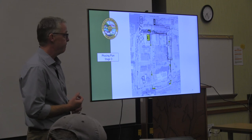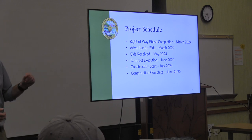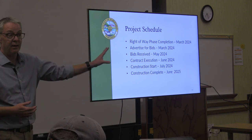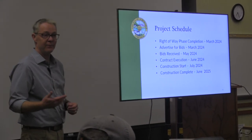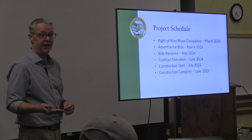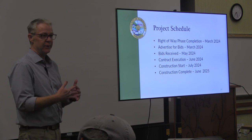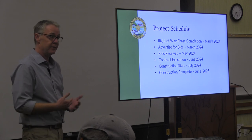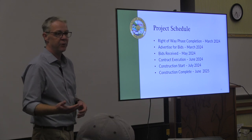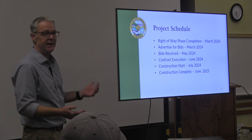Correct. Okay, understood. So here's the project schedule, and I'll tell you, there's breaking a little bit of news today. We had intended to bid this project together with the Barnes Lumber project that's off to the other side. But we got that break that I mentioned with them getting their last property acquired. We're just entering that phase for the Barnes Lumber project, and so that will take a while. We were planning to bid them together so that they were coordinated and potentially realize some savings, but we think delaying this project for a year or more to align with the other project would probably cost us more money, and then the whole area would be a construction zone, so it would take away some of our options to maintain access and have a safe area.